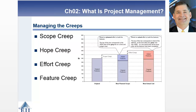Effort creep is the result of a team member working but not making any progress proportionate to the work expended. We'll discuss in later chapters how to estimate task duration, and sometimes those estimates don't work out as planned — tasks take much longer. That's effort creep: it's taking much more effort than was planned in the original project plan. Finally, feature creep is related to scope creep — team members arbitrarily add features and functions to the deliverable that they think the client would like to have, which makes projects late.